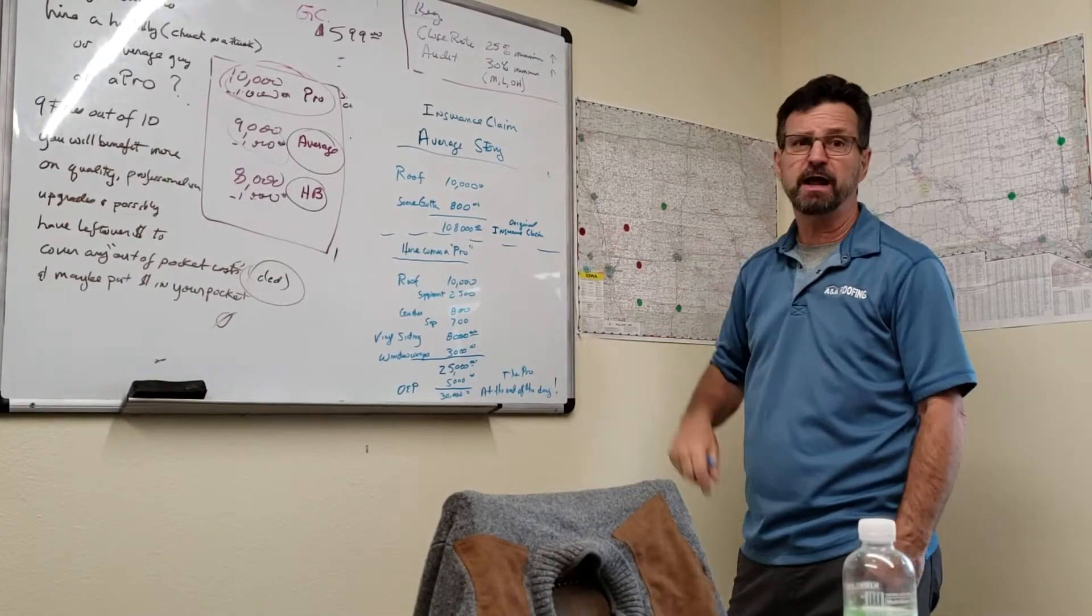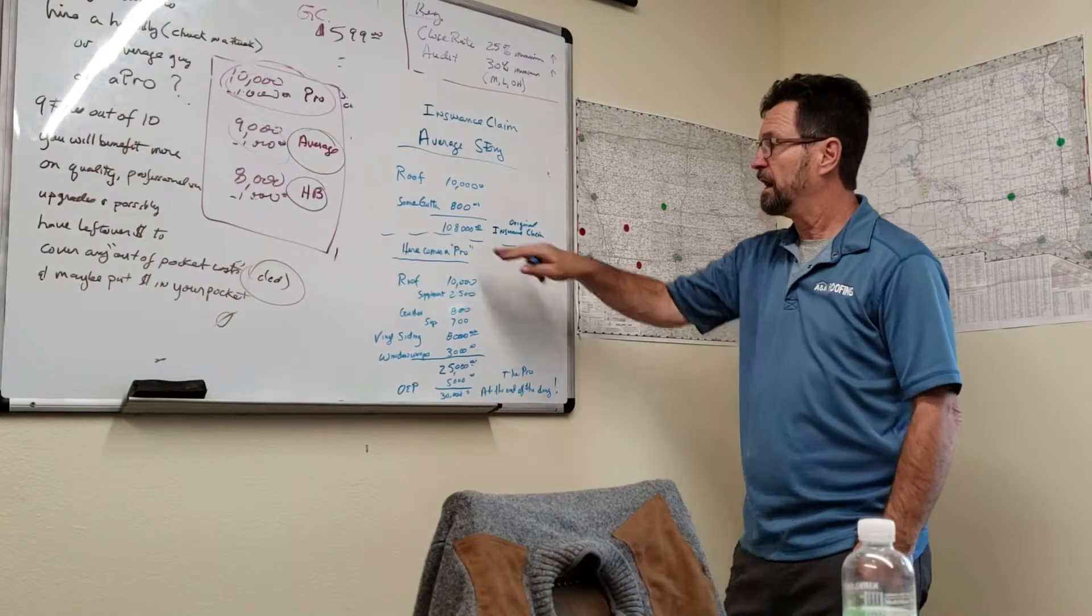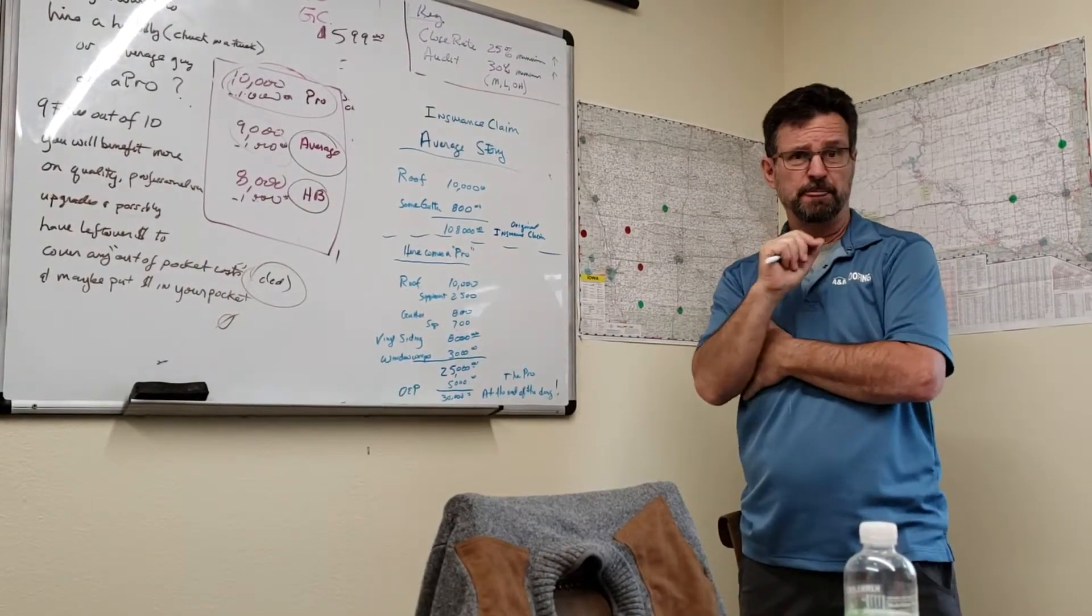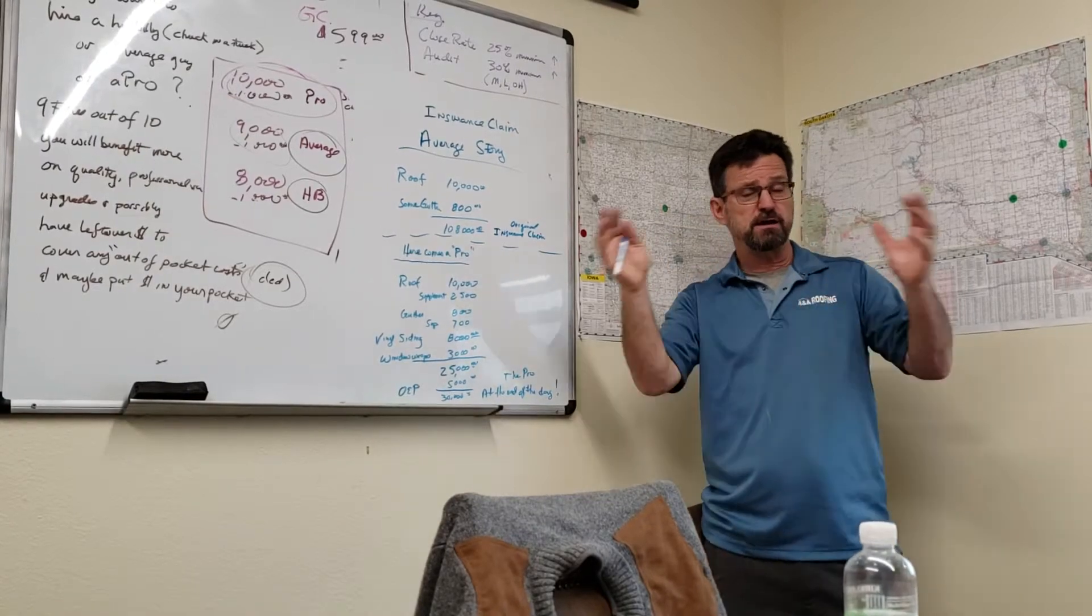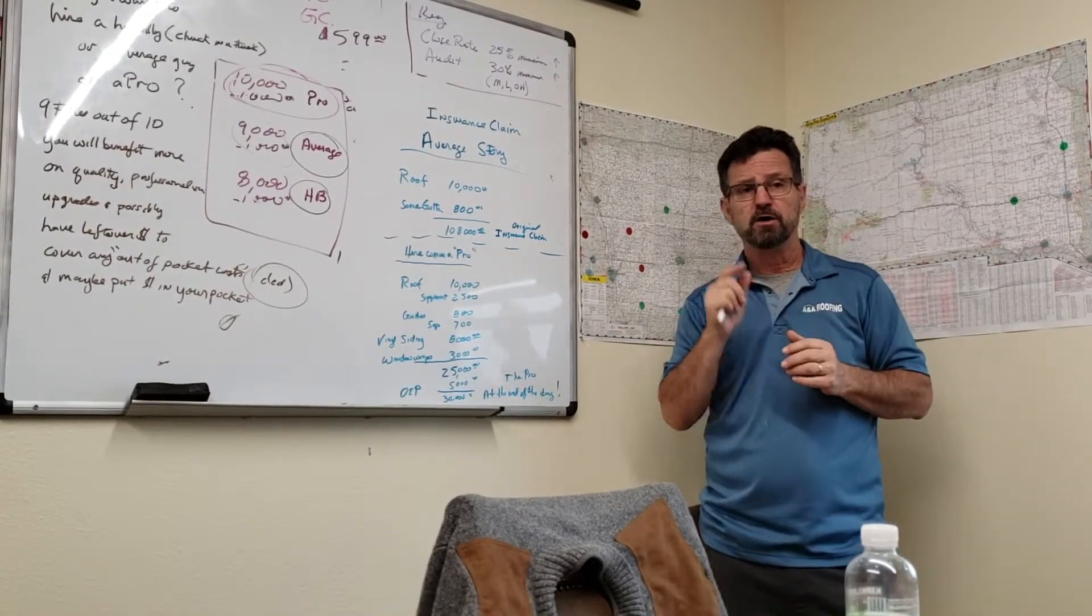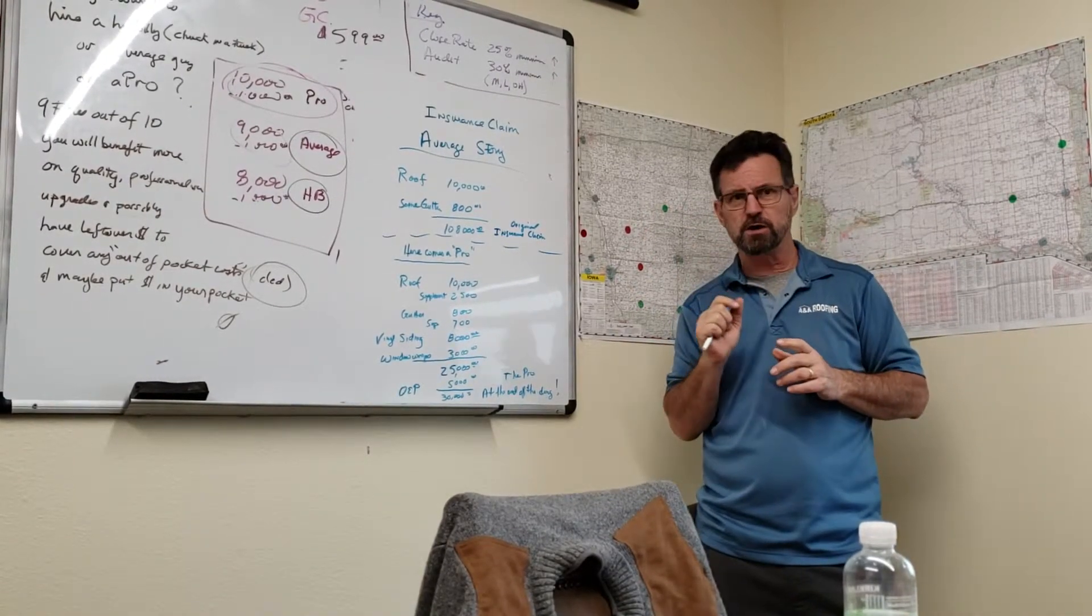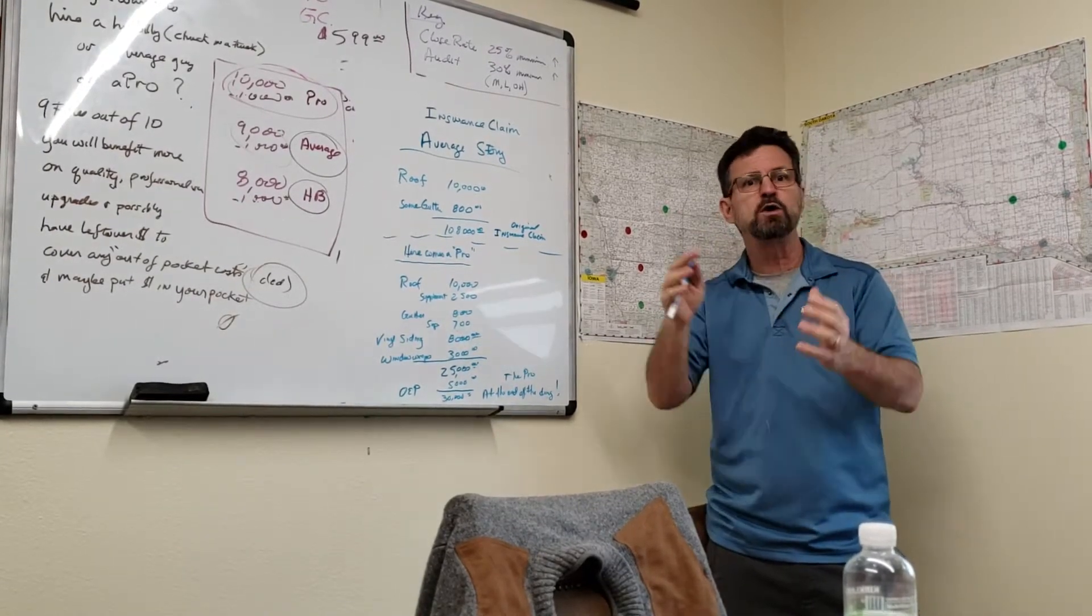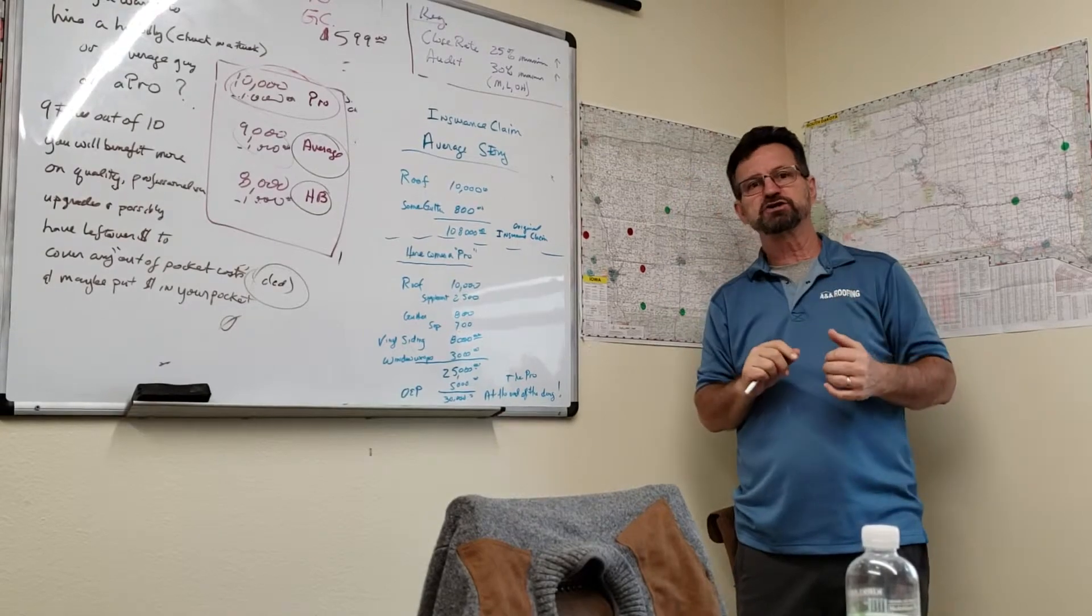I'm going to write up an insurance claim for you for $10,800. I'm going to give you a starter check so you can hire a contractor and get started. Now, when that contractor's done with his work, you send us a bill, say the work's completed, and we'll release the depreciation.